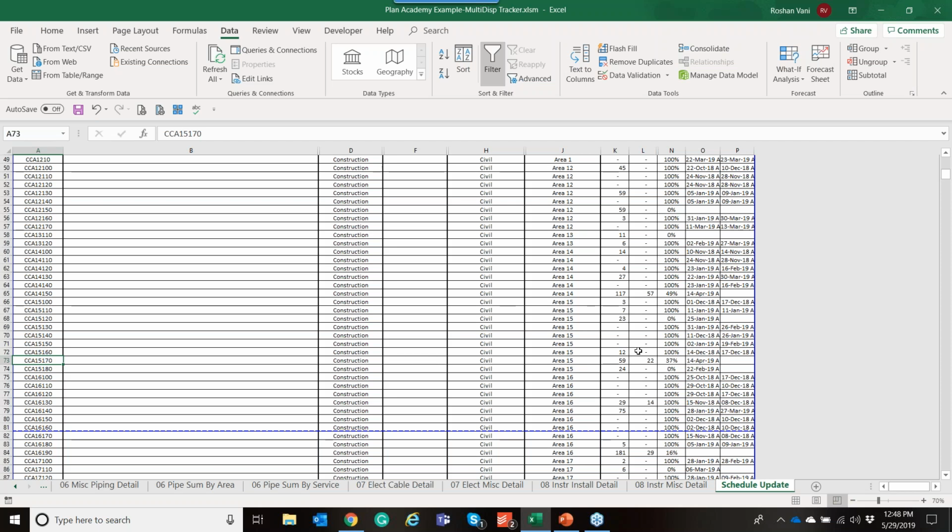We literally found on a consulting engagement, we were trying to validate project progress on, I think it was a $3 billion job, rounded numbers. They were off by 5%. They were over-reported by 5%. They had paid them. And you can do the math. That's a lot of money, yeah, on a percent complete based invoicing.